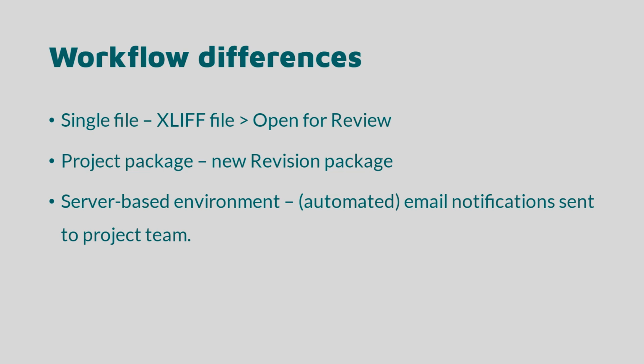In the server-based environment, passing files on to the reviewer can be an automated process, and as the linguists working on the project are sent login details to access the server, there is no need for the project manager to receive and verify the translated document before it is sent out again to the reviser. When initially creating the project on the server, the project manager can specify that quality assurance checks must be completed by the translator before the system will allow the translation to be delivered and considered completed.